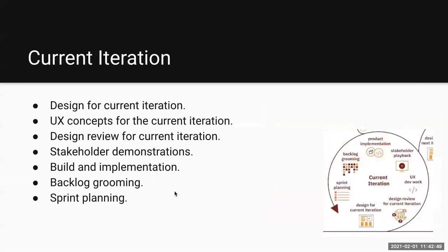So in the current iteration, you're designing, you're doing UX concepts. So that is flows and how people have different emotional states, thoughts, what is frustration, what is success. Doing a design review, doing a demo for stakeholders, building it and implementing it, and also doing some of that planning work. So more backlog grooming, preparing the backlog every single iteration to make sure that there's an opportunity for adjustment. And it's a routine, not a reaction.